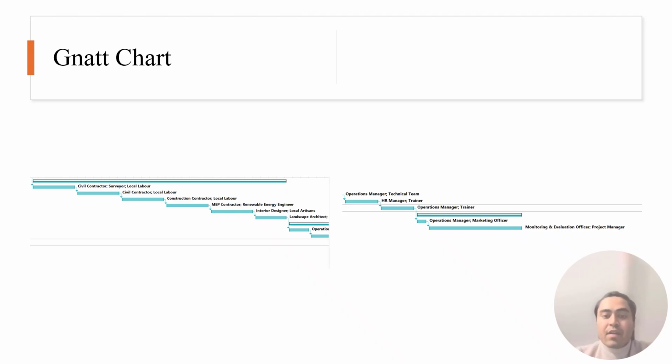The construction cannot begin until all the permits are in place and the main contracts are signed. I have also structured the timing to reflect the local climate and access conditions. In Mustang, major earthworks and concrete works are scheduled outside the peak monsoon months, and there is some float built into the program to cope with a possible road closure or delay in material delivery.